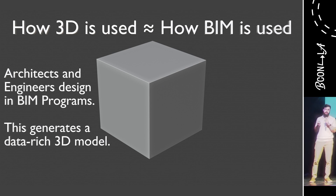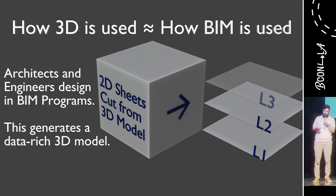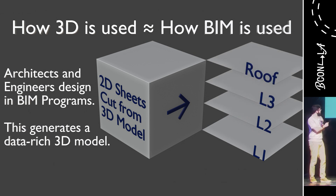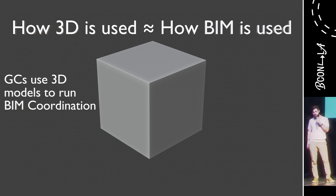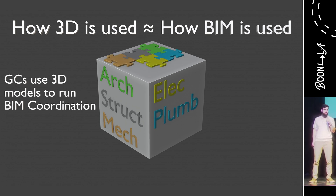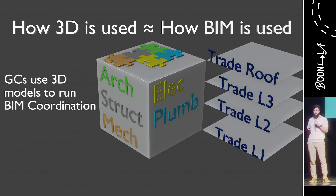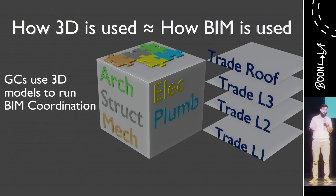The answer to how 3D in construction is generally used is actually pretty similar to the answer of how BIM is used in construction. Architects and engineers are designing in BIM programs and this generates a rich 3D model. They then take sections of this model to generate 2D sheets at different levels of the project. General contractors use this 3D model and run something called BIM coordination — essentially like solving a giant 3D puzzle with the pieces being architectural, structural, mechanical, electrical, and plumbing models. You'll often hear those last three referred to as MEP. At the end of this process, trade experts — also called subcontractors — get 2D installation drawings that should be clash-free and constructible, meaning able to be constructed.